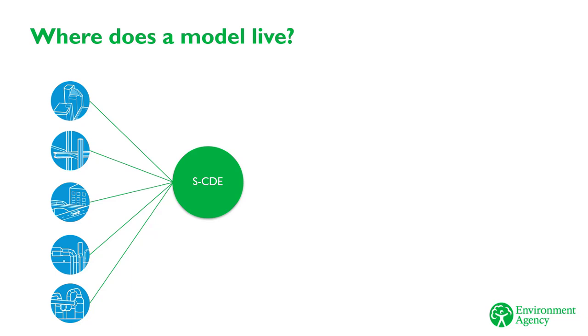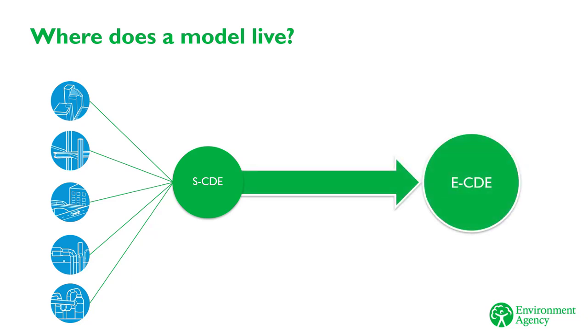The Supplier's Project or Information Manager is responsible for transferring files to the Environment Agency CDE, submitting them to the relevant Environment Agency Project and Information Manager. They check that the file is meeting all defined delivery requirements, like is it in the right format and has the right metadata. If this is confirmed, the manager accepts the file into the employer's CDE. They also make sure it's distributed to the EA project team for their review.